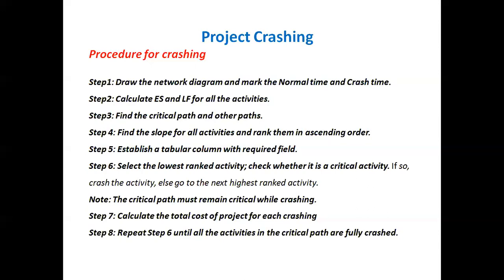One more thing to be noted while crashing the critical activity is that the critical path must remain critical while crashing. Even after crashing that critical activity, it should remain on the critical path.